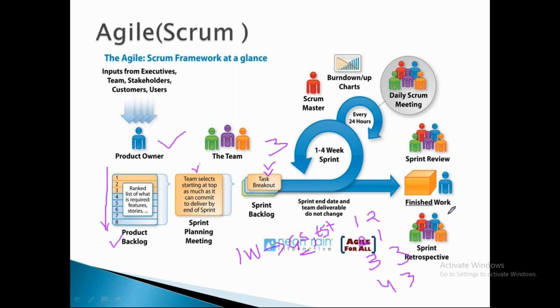Overall it should be 15 days, because 3 weeks means 5 days a week. So for total stories 1 to 10, how many days will it take to complete? They will plan. So within these 15 days, all the 10 stories need to be completed. Like that, estimation in the first week, and then in the second week they will start.